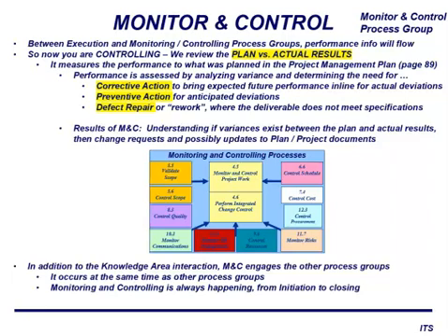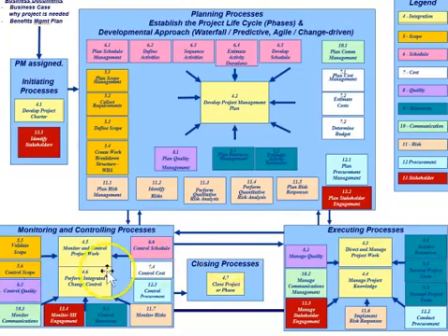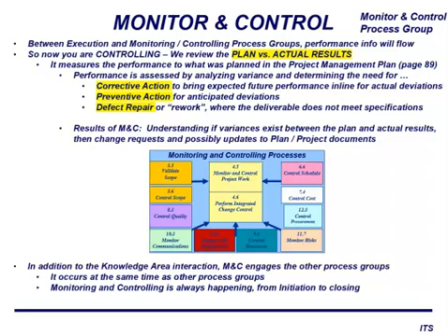Monitoring and controlling is different from the planning phase, where the project team determines what steps they have to achieve to accomplish the goals and build this action plan. That was previously, and that's what we execute. In monitoring and controlling, we watch, we monitor, and we analyze our progress. We're looking for variances and risks, and we're taking action against those. And that's why monitoring and controlling happens at the same time as I'm executing. I am looking for risks and making recommendations and changes, but those changes will go back into execution right here.